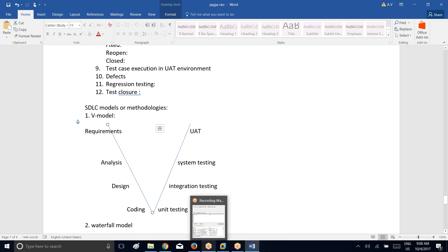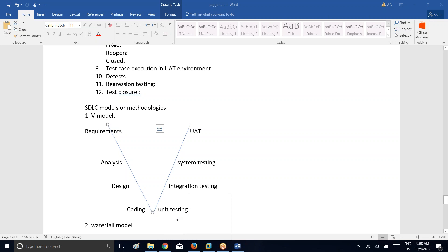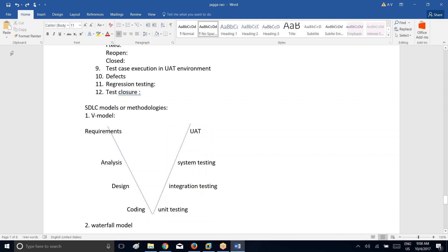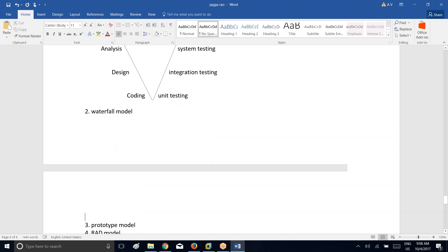V model is suitable for long-term projects — if the project is for three or four years, then only we go ahead and use this V model. Now coming to waterfall model. Waterfall model is suitable for short-term projects in which the clients are having a limited budget — very very less budget. The project can be for six months, eight months, or one year.